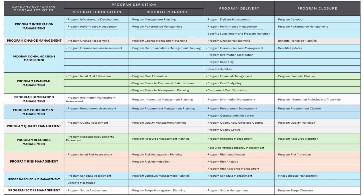Program information management ensures that accurate and timely information is available to those who need it across the program. In the formulation phase, an assessment is made of the program's information needs and how that information will be managed. Program information management planning develops a plan to manage and control the flow of information, ensuring accuracy and timeliness. During delivery, this ensures the proper handling and distribution of program-related information. At closure, all relevant information is archived for future use, and information systems are transitioned as necessary.